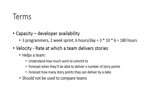Velocity helps a team understand how much work to bring into a sprint, to forecast when they can deliver a set number of story points, and they can also forecast how many story points they can deliver by a specific date. Velocity is based on story points, and typically the meaning of story points varies from team to team, so usually velocity should not be used to compare the performance of teams.